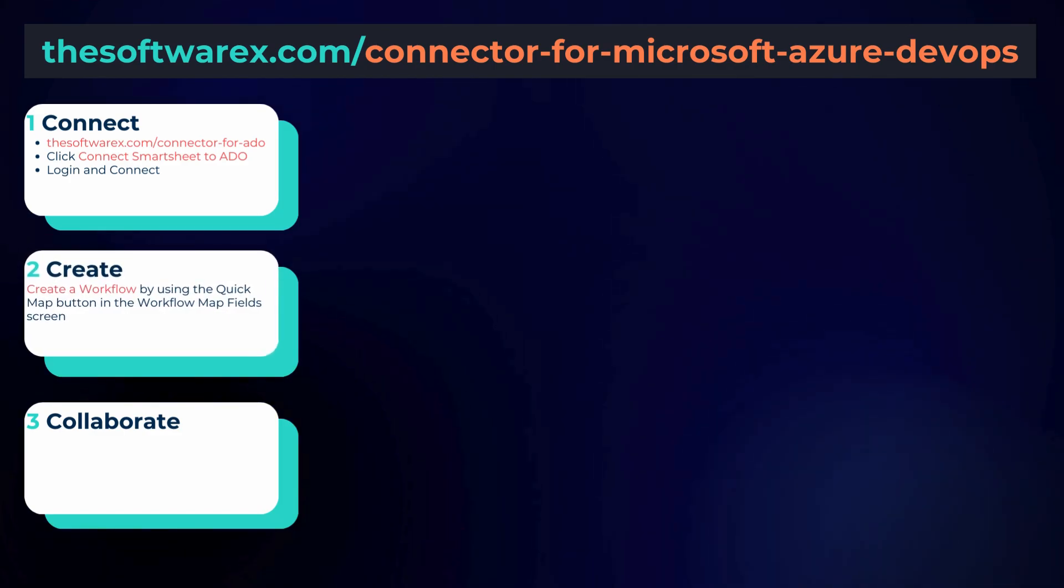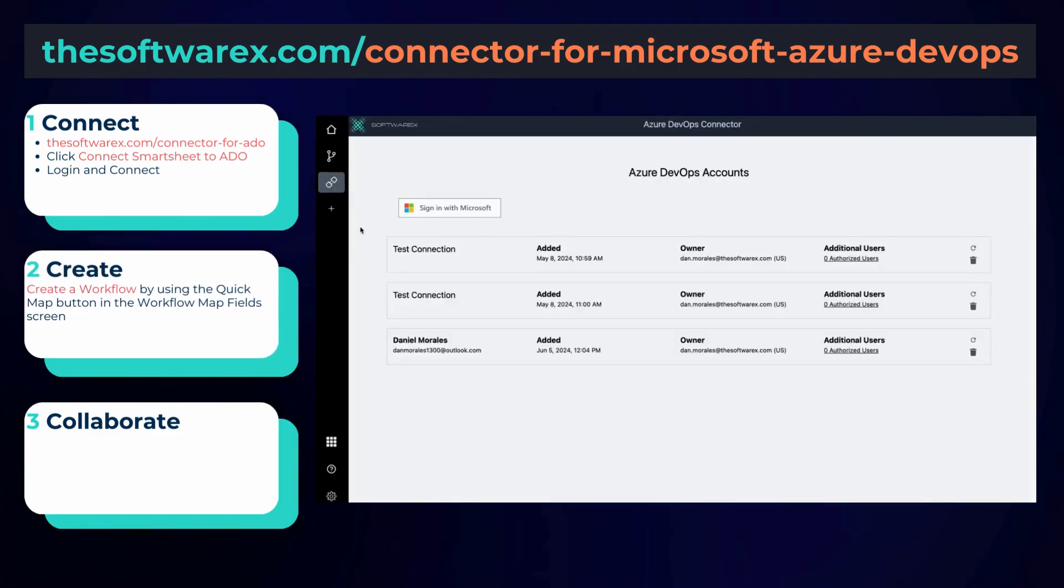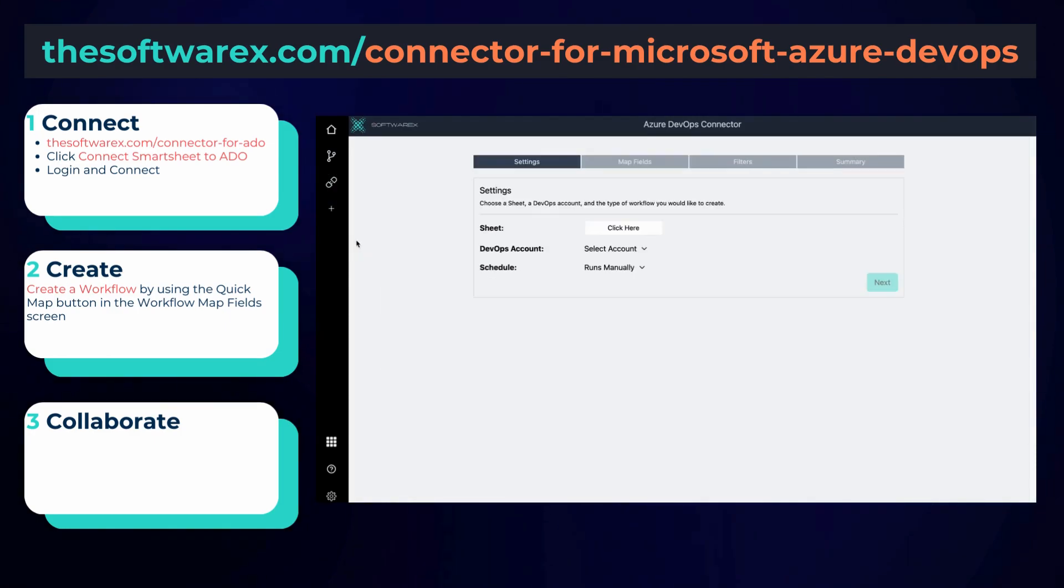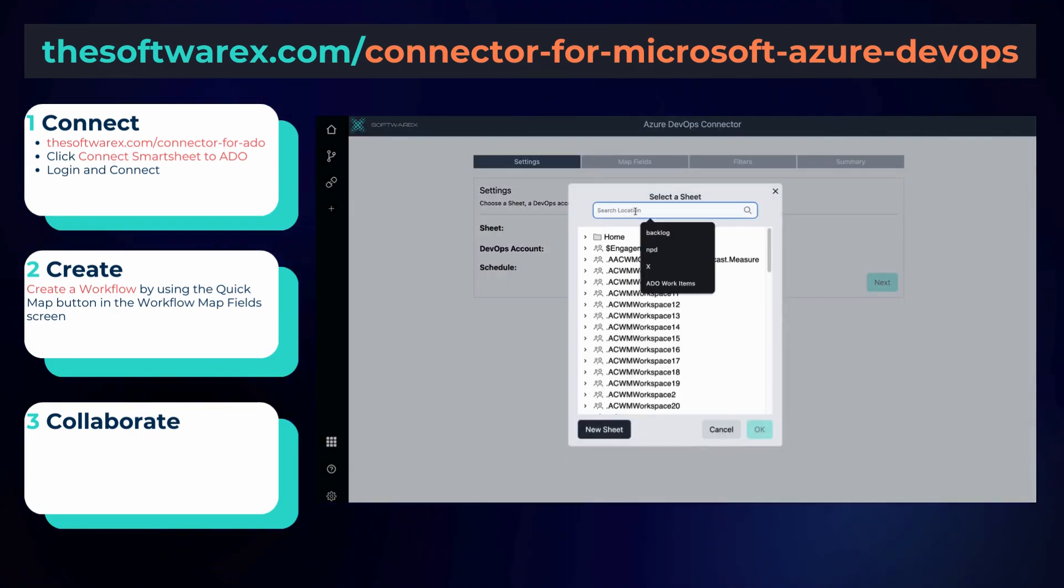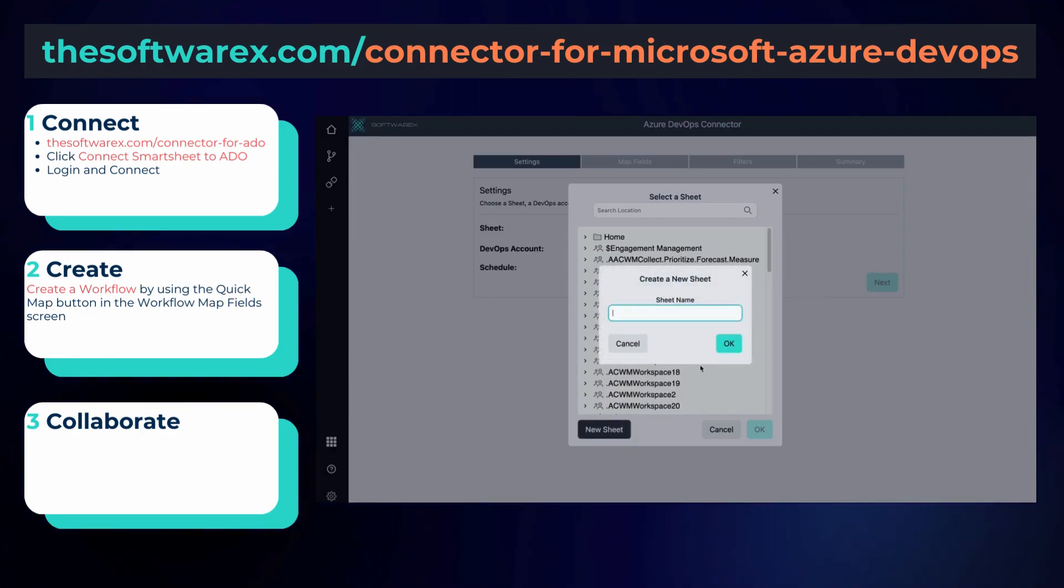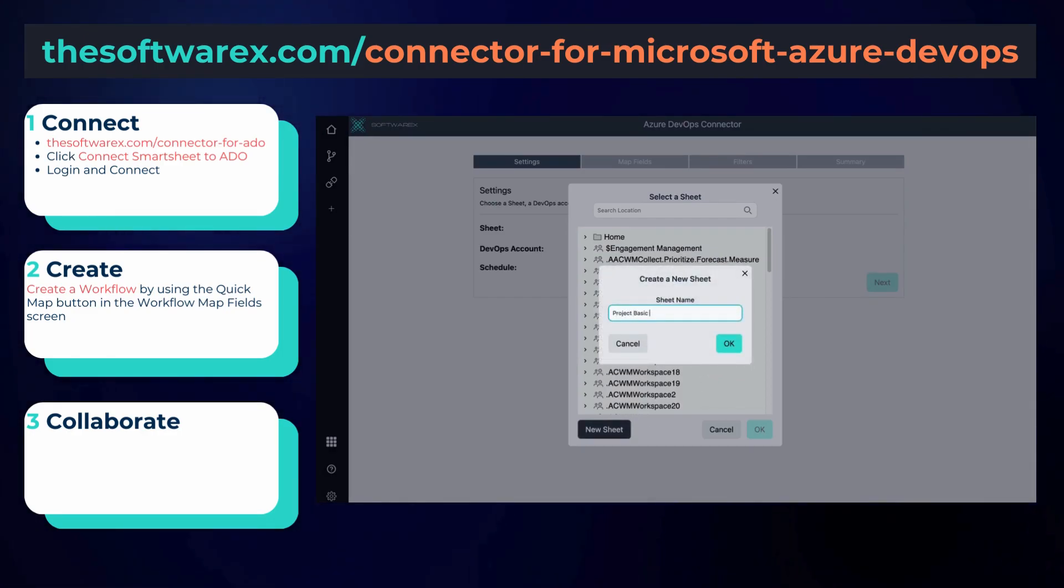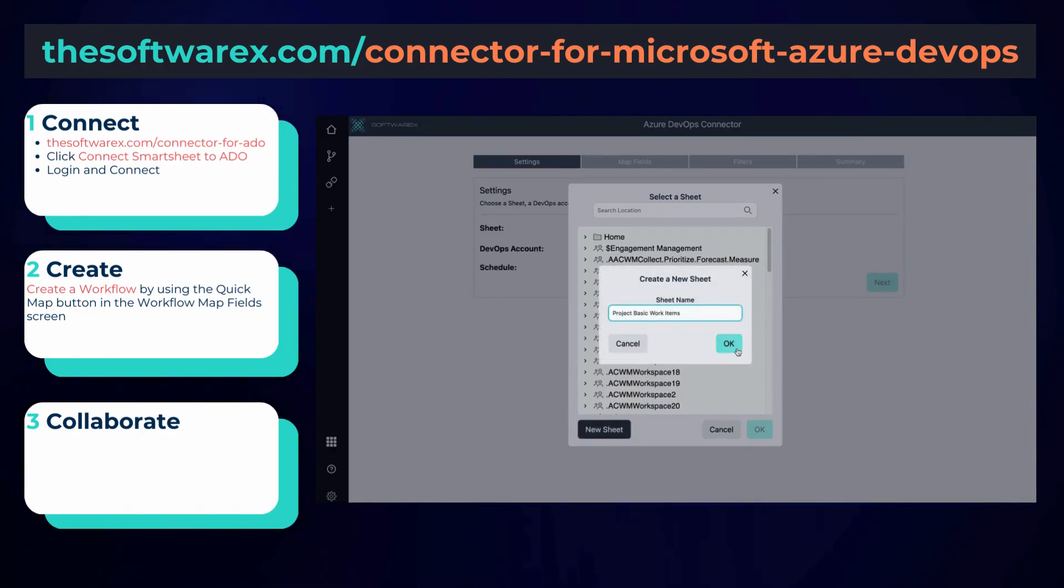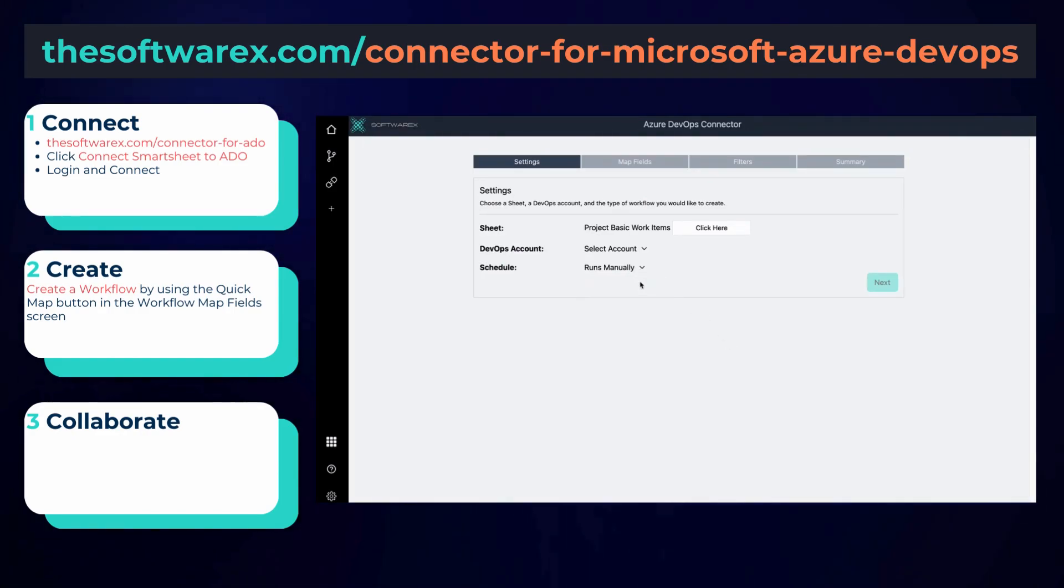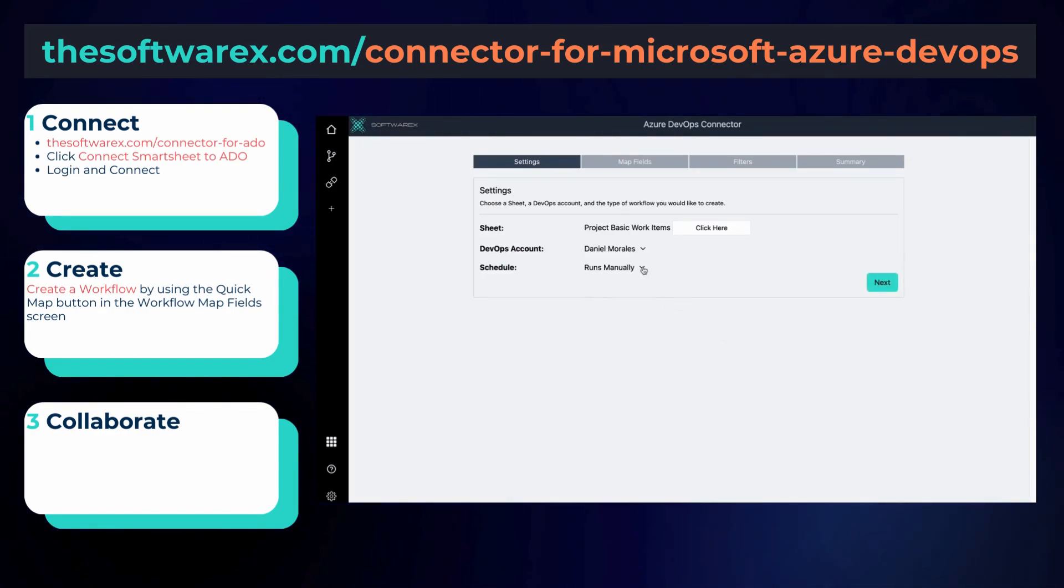This workflow screen is where you can begin to make the individual connections between work items in ADO and your sheet in Smartsheet. Now there are a lot of options here for you to control the data flow direction, such as pushing new rows from Smartsheet or disabling that feature so that data only comes from ADO and isn't written into ADO from Smartsheet.